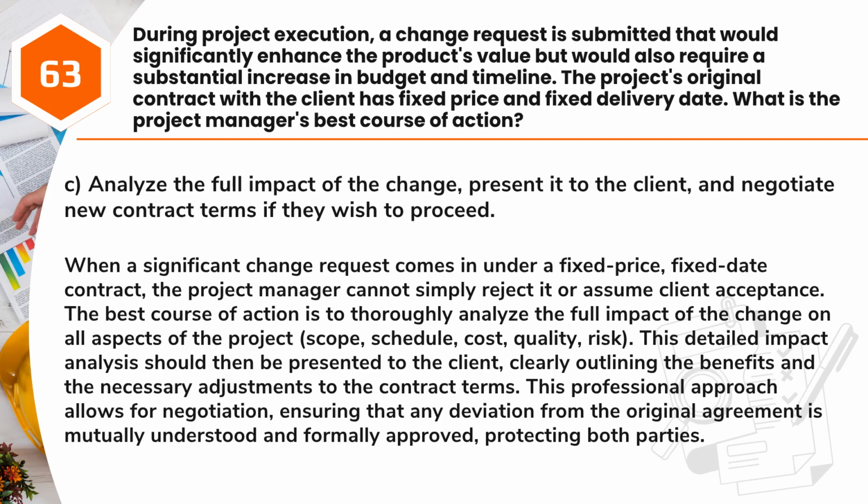This detailed impact analysis should then be presented to the client, clearly outlining the benefits and the necessary adjustments to the contract terms. This professional approach allows for negotiation, ensuring that any deviation from the original agreement is mutually understood and formally approved, protecting both parties.